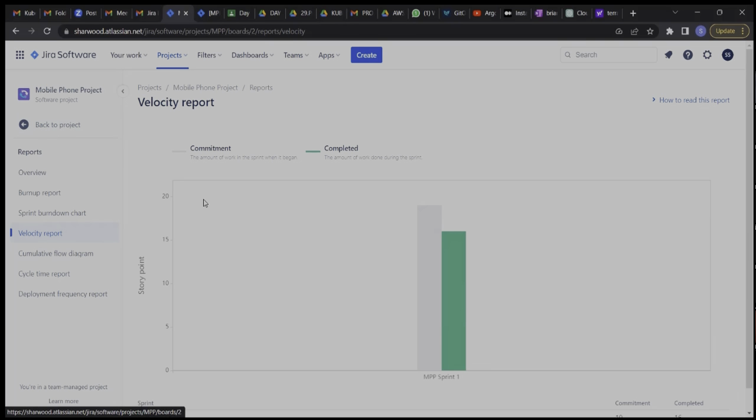So when you come to your retro, before you dive into what went well, what did not go well, and the action items, you want to look at the previous retro. Because every retrospective is good to come out with something, an action item that the team needs to improve on. So you want to first pull up the action items from the previous sprint and say, hey, team, these were our action items. Were we able to accomplish these things that we agreed as a team we were going to improve on? So you first see if the action items from the previous sprint were achieved, then you dive into the next sprint.